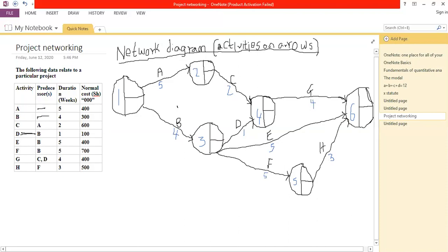Reason, we need to fill in the areas to which, for example, an activity, let's say A here, can actually begin. Also, when can it earliest end, and the beginning of it is marked by a node, the end of it again is marked by a node. So these ones, we call them the earliest event times. In the calculations of these particular variables, which are going to fill in the upper and the lower ends of our nodes, we are going to use what we call the forward pass and the backward pass.